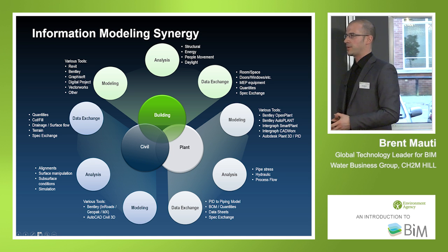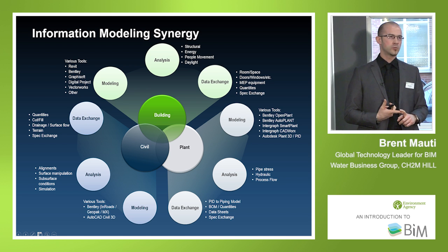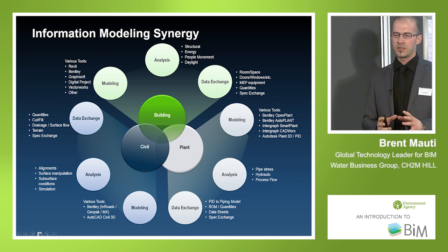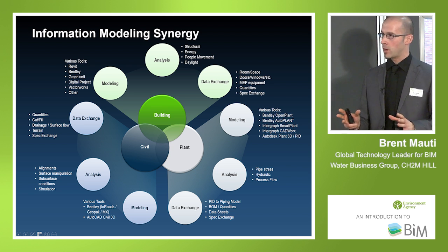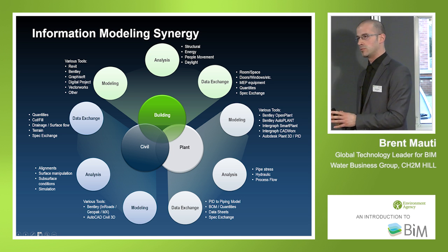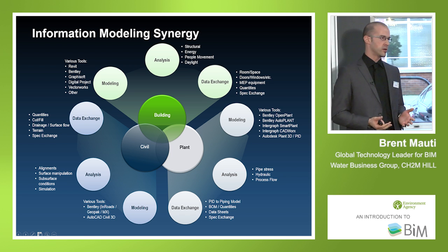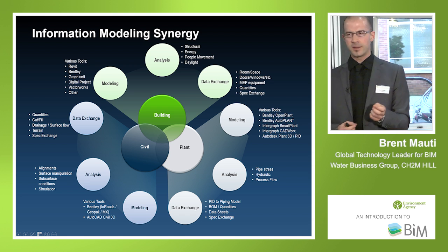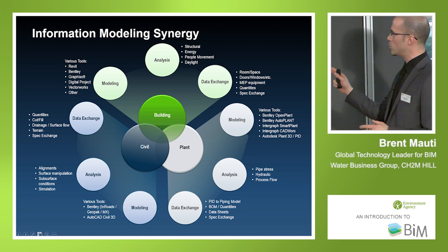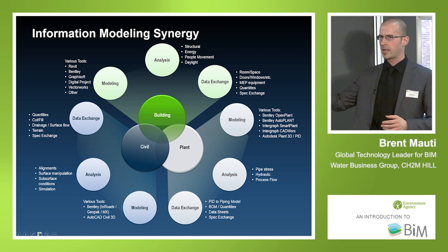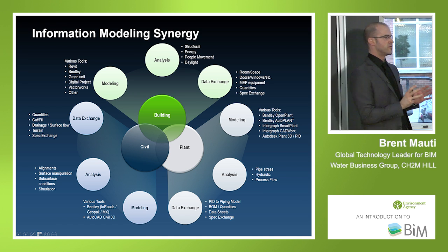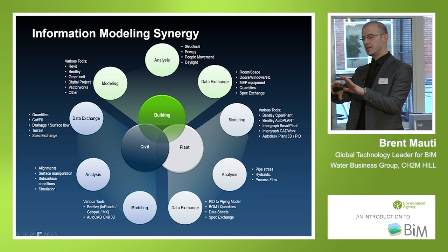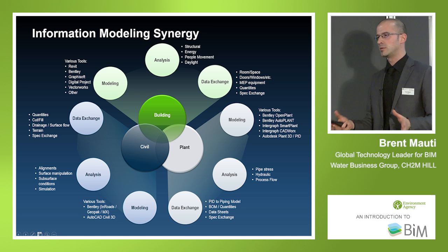When we're working on plant-based tools, so that would be water, wastewater plants, linear conveyance, piping, etc., we've actually done a lot of work on defining the requirements void of the tool. So we built what's called piping spec narratives, and we fed them into our corporate procurement system. From those spec narratives, the system can then feed, whether it's OpenPlant, AutoPlant, SmartPlant, CADWorks, etc. So we can take the narrative, feed it to any one of those systems, and thus achieve a common data definition regardless of the tools being used.